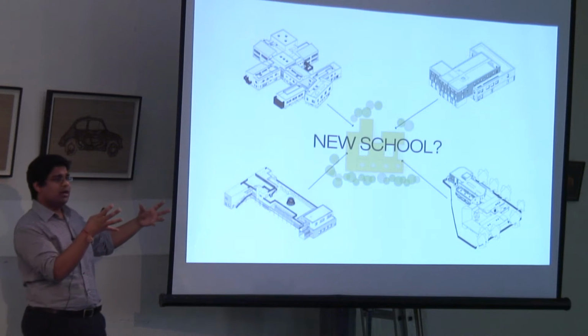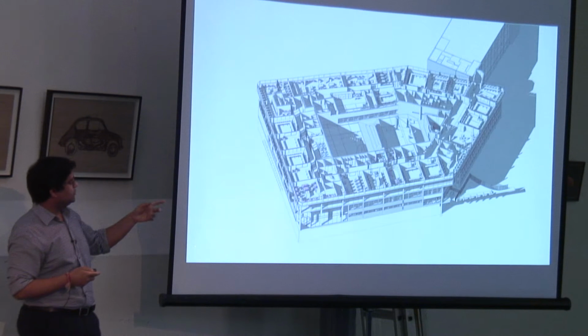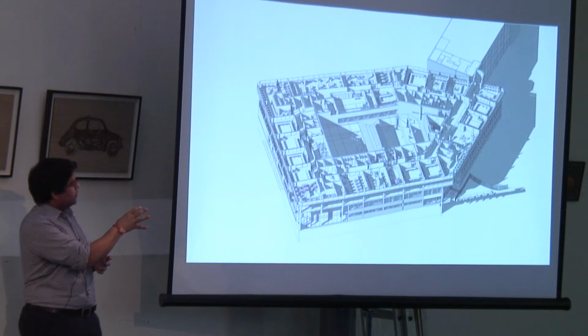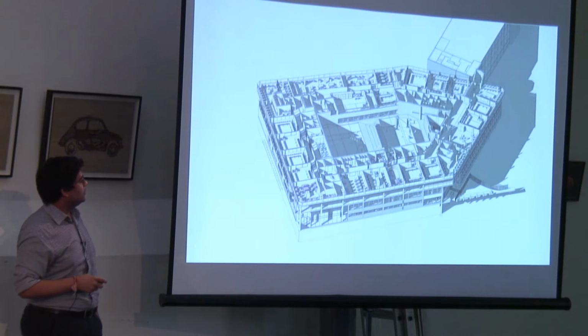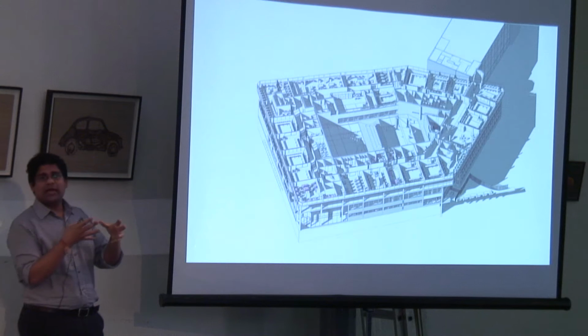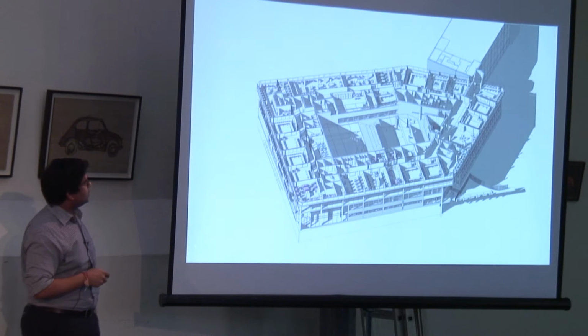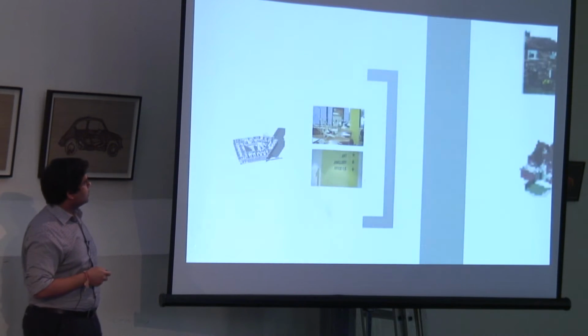And obviously you can blow that apart and then bring that together in a new project, which is what we did in this scheme, which is for the local authority, Westminster, where we had around about 8 months from essentially starting from being appointed to completion to refurbish and remodel 3 or 4 stories of their second largest asset in London. So that could only be done because we had all that data from before and we're able to blow that up and put that back in. We could spend more time on actually working on the complex interfaces rather than the layouts and so forth. And sort of the end products.